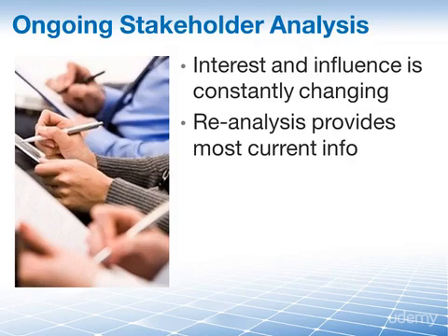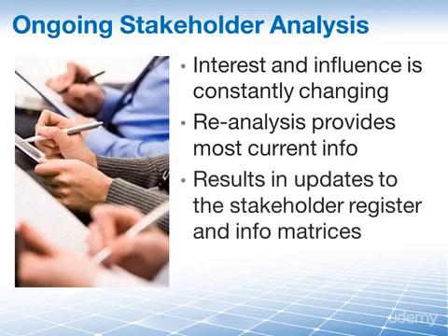Re-interviewing stakeholders at certain checkpoints during the project will help address issues as they arise, manage and resolve conflicting interests, and foster continuous stakeholder engagement and satisfaction throughout the project. While performing this ongoing stakeholder analysis, you as the project manager will be in charge of updating 3 key types of documentation, which are the stakeholder register, the stakeholder management plan, and also any stakeholder information matrices, such as this power influence grid that we mentioned earlier on.